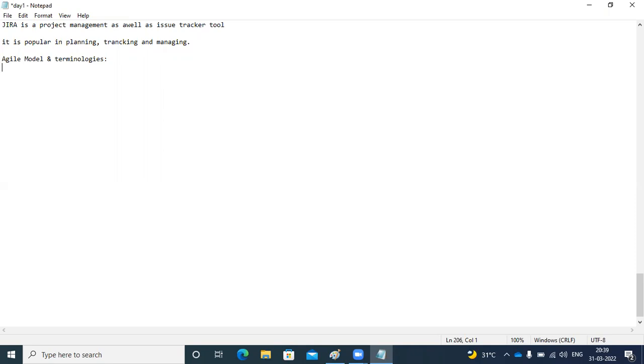Deadlines are very near for the minor things. We take only 2 tasks and keep the deadline 1 week or 2 weeks ahead. Once that is done, we take a new task with another deadline of 2 weeks or so. Likewise, it is an iteration process. In that manner, we can deliver the software product incrementally.